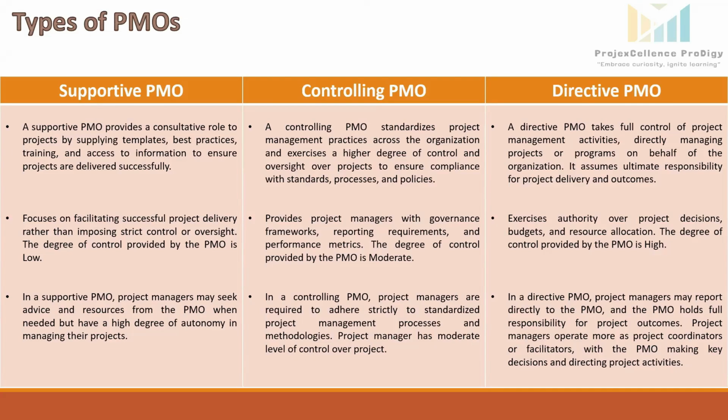In a directive PMO, project managers may report directly to the PMO, and the PMO holds full responsibility for project outcomes. Project managers operate as project coordinators or facilitators because all the power and control remains with the PMO.